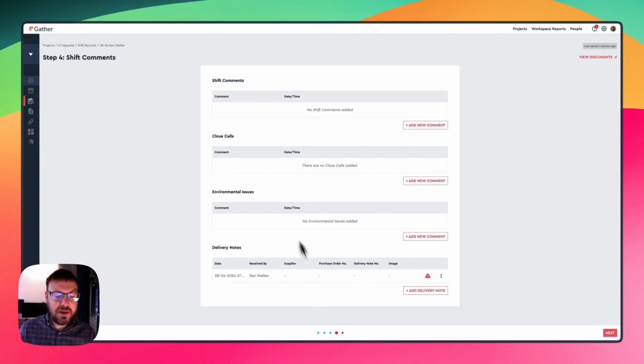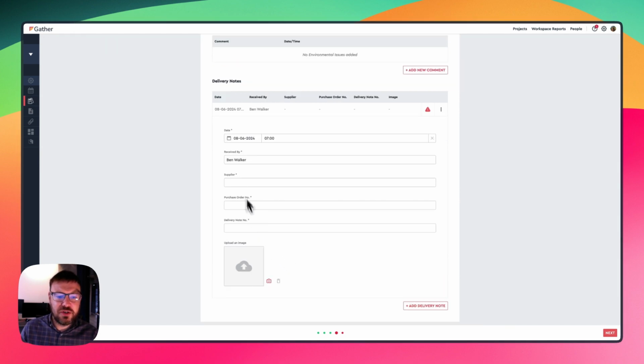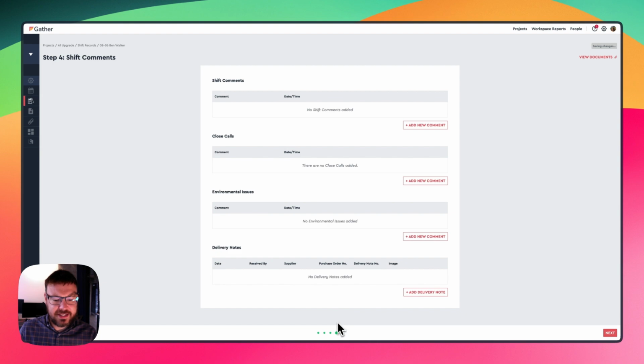We can add other information around comments, close calls, environmental issues. The headers might change to your sector, you might not call them close calls. Delivery notes, we capture that information as well. So it would be received by, and the supplier, purchase order, delivery note number. So going away from that traditional process gets the finance people happy as well. The three-way match in terms of doing GRNing, it's all there. And again, we want this to be easy for field people, not dealing with scraps of paper. It's all in one place. So I'll just delete that off because we haven't got one to add today.